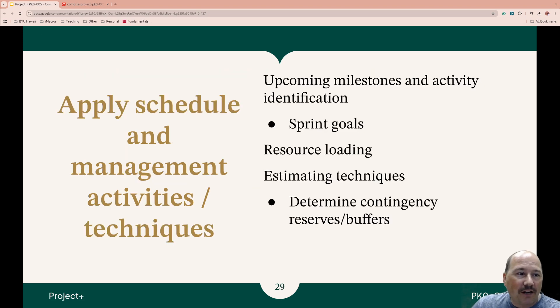Project Plus, Applying Scheduling Management Activities and Techniques. When we're thinking about upcoming milestones and the activities that we're going to identify, they'll be part of a sprint goal. That's in Agile Project Management where we think of these small timeframes where we focus on specific deliverables and try and get them out quickly. We also need to be thinking about our resource load. So we are assigning those tasks, project tasks, over time to specific team members, resources. Each team member or resource, we want to make sure they're not over allocated, so they have too much to do, or underutilized, they don't have enough to do.